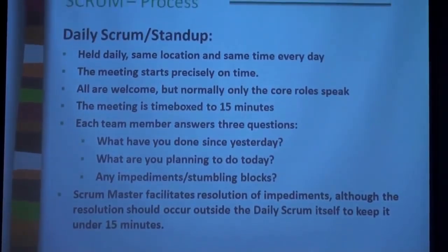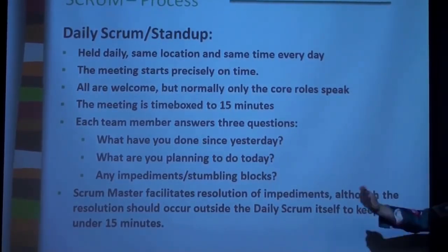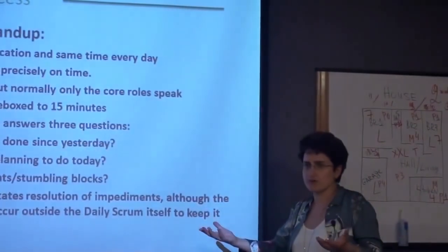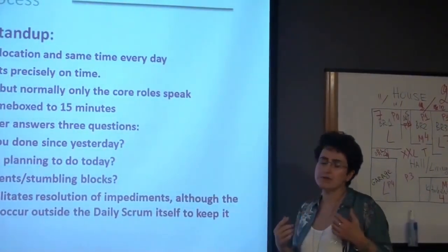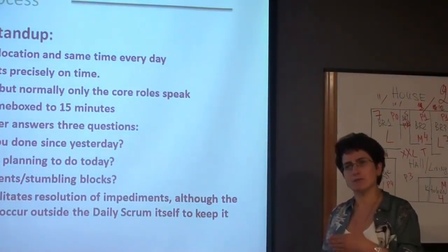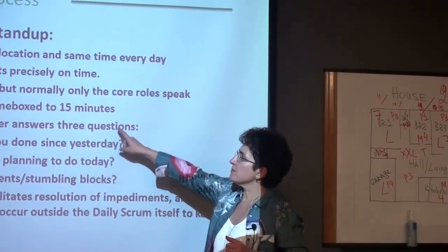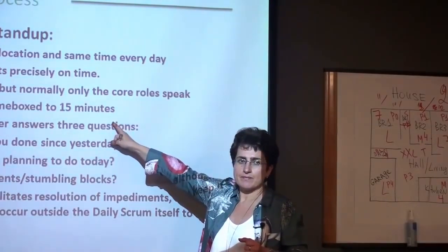Maybe you have some questions on how to develop or how to test. And then as we move forward, the product owner, unless he has some updates, may not have too much to say, but then the key speakers on those daily stand-ups would be the developers and testers. So we need to track the progress on how much development work is done, how much testing work is done. And this daily meeting is time boxed to 15 minutes.